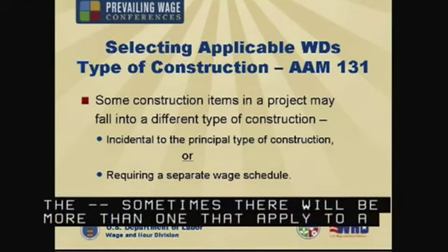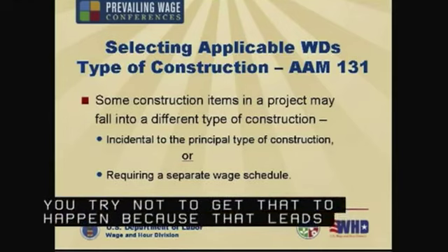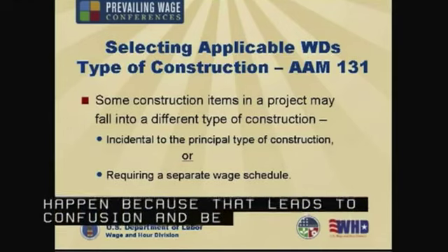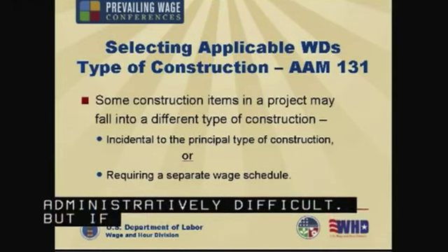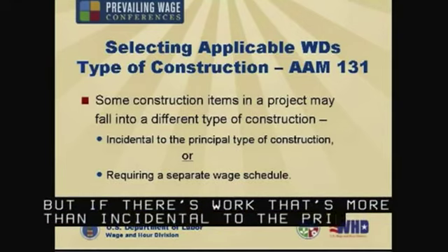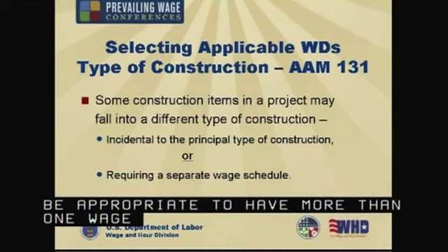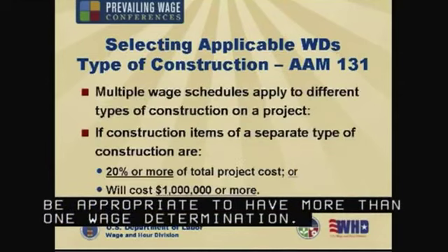You try not to get that to happen because that can lead to confusion and be administratively difficult. But if there's work that's more than incidental to the principal type of construction, then it would be appropriate to have more than one wage determination. Multiple wage schedules apply to different types of construction on a project.